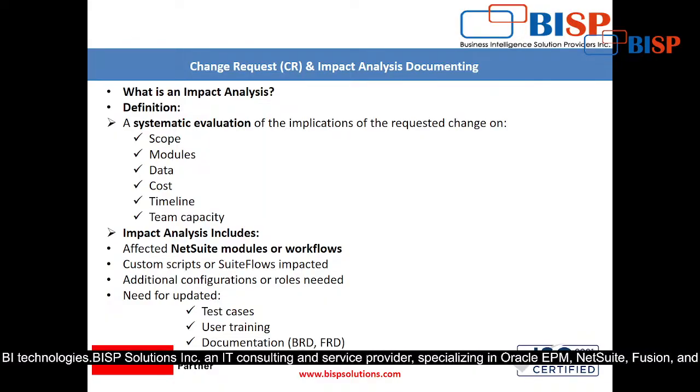Why? Because I have to make changes in the document also, that previously the process was something like this. Now your stakeholder has changed something and now the process is different. So I have to modify the same existing document, and again reschedule the training meeting.